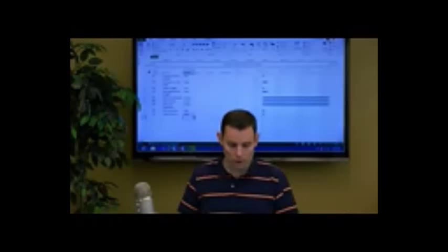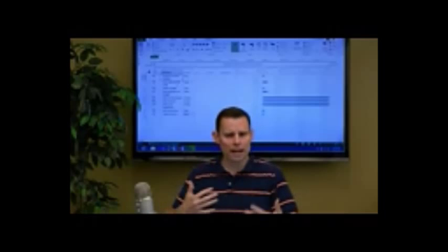It's probably a little less for the equipment, but might as well just give it the same one for the purposes of this demo. And then set up the party. The event planner recommended a day for the large scale party that we're doing, and then the actual day, she said, yeah, allow for the actual party to happen over a day as well. So now you see we've got some big bars over here, and the project's starting to take shape. Again, resist the temptation to be over here on the right. Okay, and now we're kind of ready to formally schedule things.